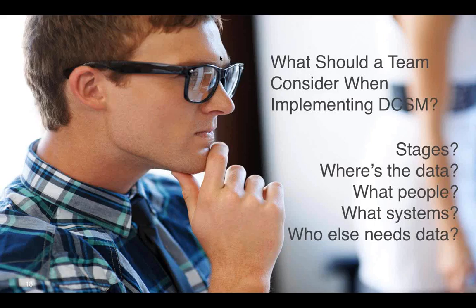First off, it's a staged process. You're not going to just leap from day one to day two and have an entire solution managing all your infrastructure, with workflow, tied into all your systems. You go in stages. We recommend to most companies you start with where's the information you have. You start with where your data is, and we always find any customer we have has data somewhere. They have spreadsheets, they've got Visio drawings, they might have a competing product to Nlyte's that's not functioning. We have tools that will migrate this information over, and you always start with asset information. That is the fundamentals, and then you begin to add things like interconnectivity and power. So the key is to start with stages.